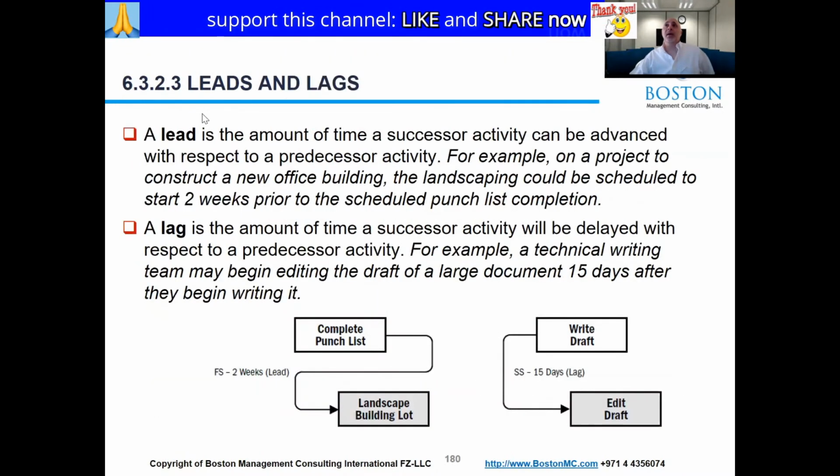Besides this, there are the leads and the lags, and I used an example on the scheduling to show you what the lag does. The lag gives you an enforced waiting period. So I said you start the first coat, we'll wait 1 day. That's a lag of 1 day, and then the second team starts the second coat, and that would be the lag.